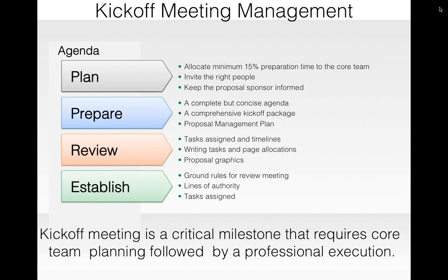You need to have very clearly defined review cycles in your kickoff meeting. You need to tell them not only about the review cycles and the review teams, but also about their internal reviews, their peer reviews, before the content goes out to the reviewing team, or the proposal goes out to a specific reviewing team.